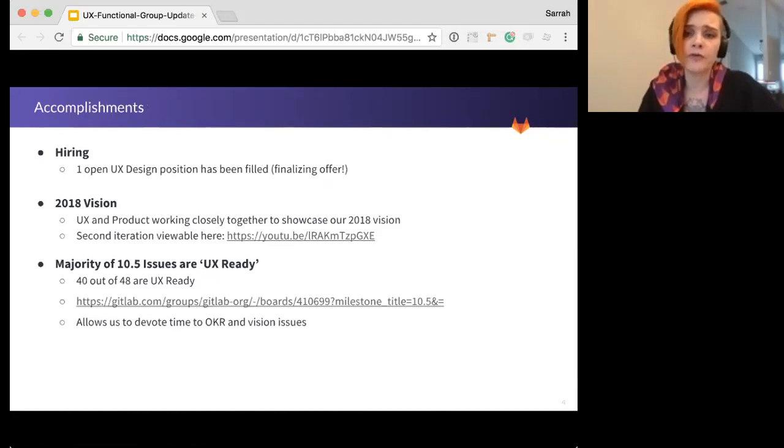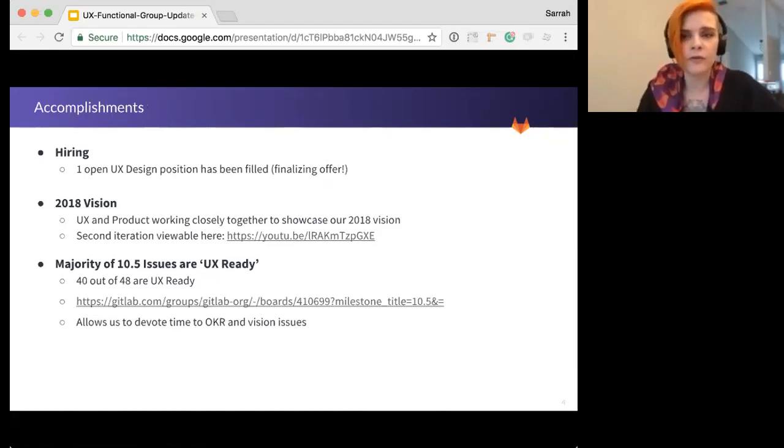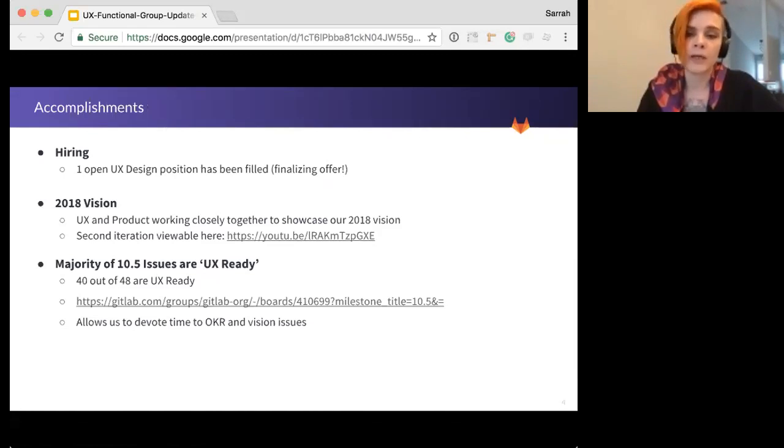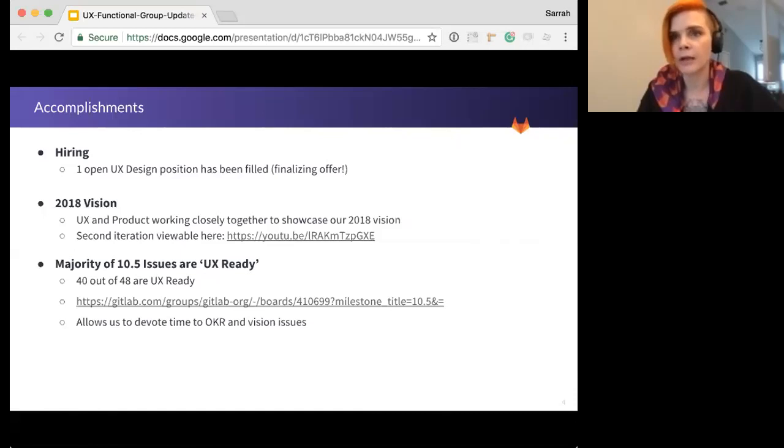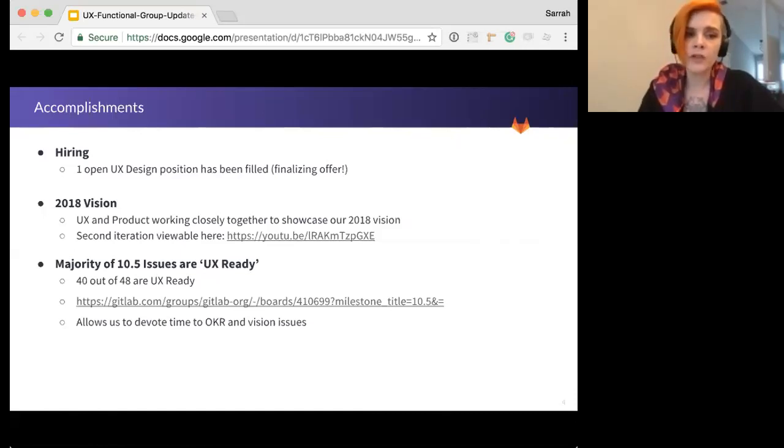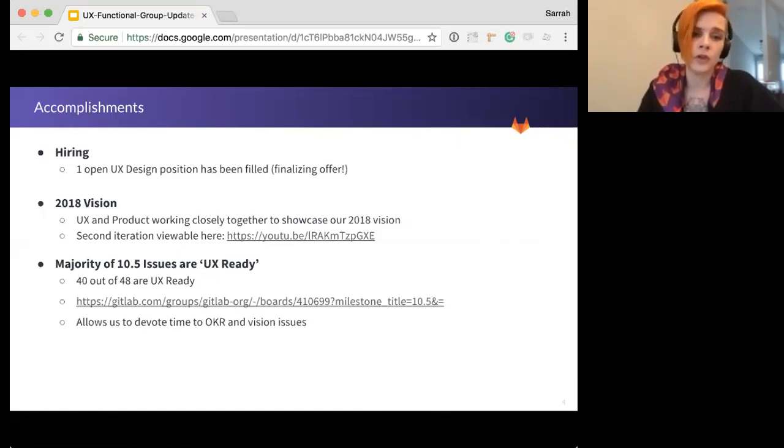And so far, 10.5 is looking really, really good. 40 out of the 48 issues are already UX ready. So that means the UX is complete and ready for front-end, back-end to get working on those. So that allows us more time to devote to OKR and the vision issues that we're already working on.